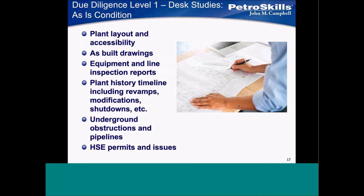Then what we call as-is condition: plant layout and accessibility, as-built drawings, equipment and line inspection reports, plant history timeline — including revamps, modifications, shutdowns, underground obstructions, permits and issues. You want to know the operational history of the facility, and when you go out there, what are you going to find? Do you have good drawings? Is it accessible? Can you get into it?